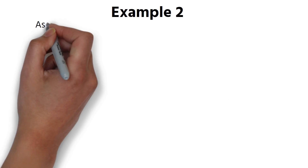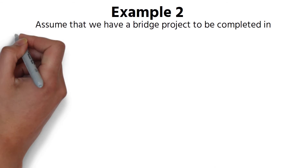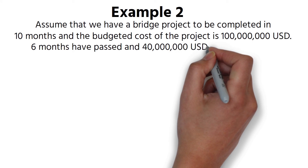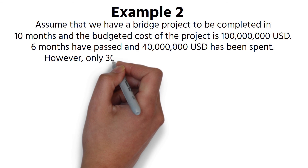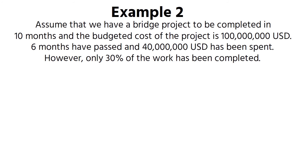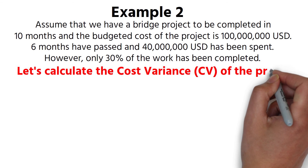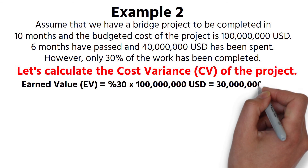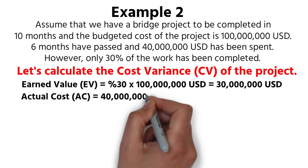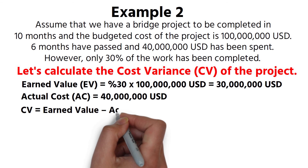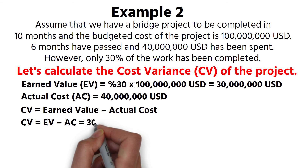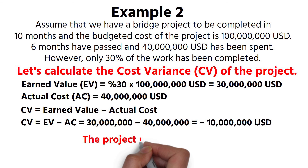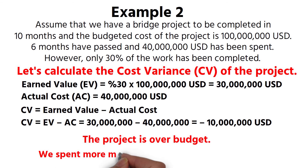Example 2. Assume that we have a bridge project to be completed in 10 months and the budgeted cost of the project is $100 million US dollars. Six months have passed and $40 million US dollars has been spent. However, only 30% of the work has been completed. Earned Value = 30% × $100 million = $30 million. Actual cost = $40 million. CV = EV − AC = $30 million − $40 million = −$10 million US dollars. The project is over budget. We spent more money but we completed less work. In order to make efficient cost control, we need to check resource productivity correctly.